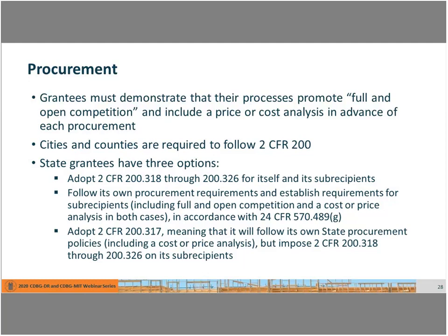We recommend that all grantees attend HUD's procurement training. Procurement is becoming a big topic with both the Office of the Inspector General and Disaster Recovery Special Issues Division at HUD. Many grantees are not properly procuring services and/or are trying to piggyback services onto existing contracts. This is not allowed. As you can see from the slide, state grantees have three options for managing procurement. But that being said, once a procurement policy is submitted and approved by HUD, any change in that policy is going to require a new HUD review.